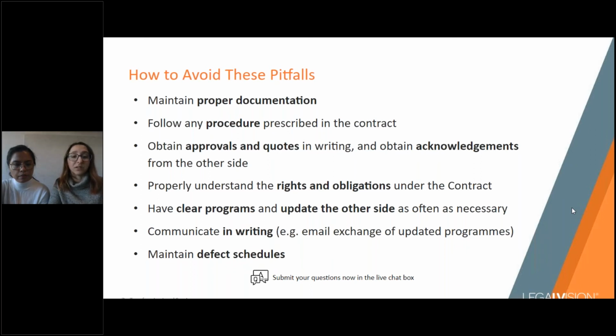With this said, if a dispute does come up and it can't be resolved, you need to understand what your rights are, including whether or not you can suspend the works. This may be a commercial option to take before getting into any bigger strife or having cash flow issues. All of the relevant terms of your agreement should be noted down in the contract. You shouldn't simply rely on pre-contractual obligations that might not have found their way into the written document.